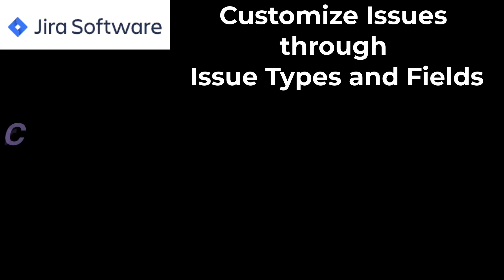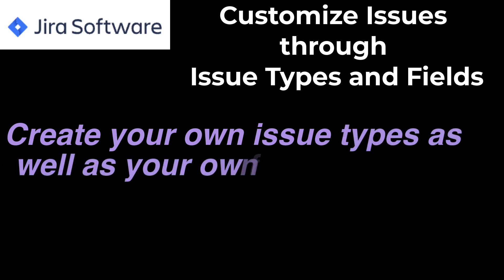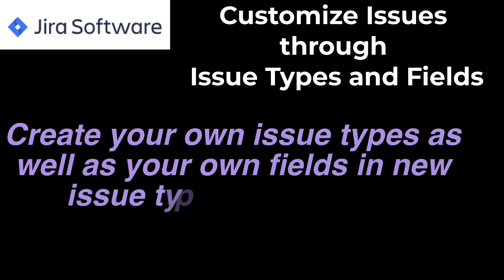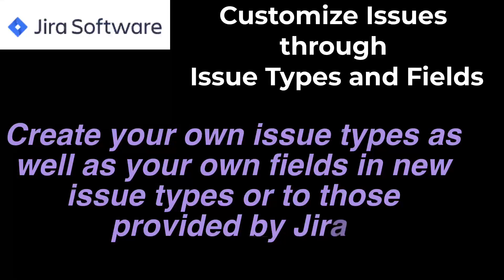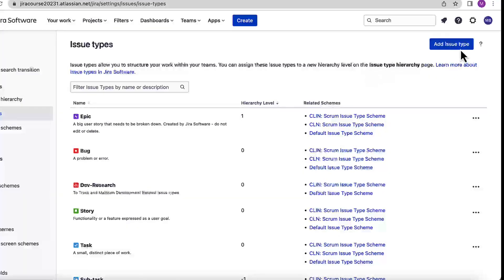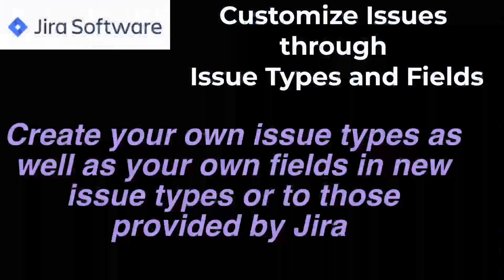Jira allows you to create your own customizable issue types so that you can be very specific while creating issues and fulfilling your project requirements. For example, you can create a special issue type to cater to the needs of a research type of issue. The workflow path of research work is always different than a story or a bug, therefore you can create your own issue type that will have the flow which you want for your research type of work.